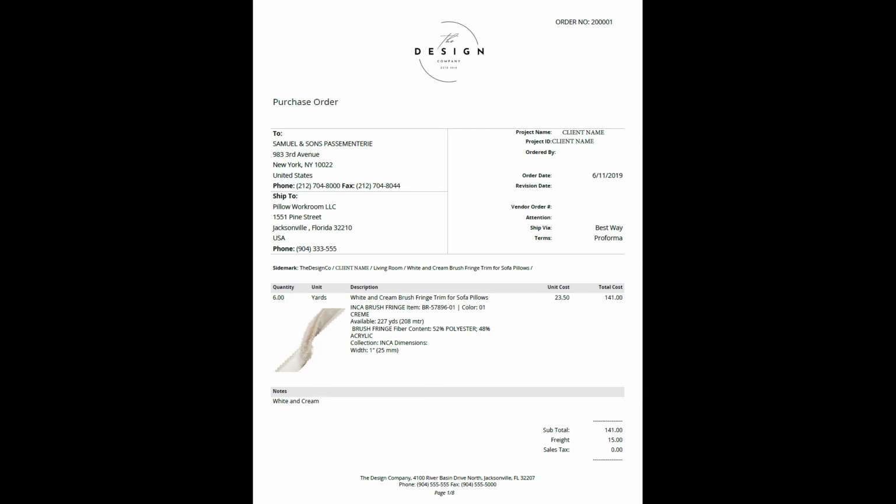The only problem is if the designer forgets to approve the CFA, then it will delay the sending of the purchase order or of the product. So there's really a lot to this, but you can see that's kind of the thinking behind the ship to. It requires a lot of trust and double checking by the designer.